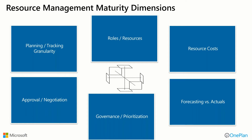Do you want the acquisition of resources for your projects to be a negotiation process — something formalized where functional and project managers can collaborate? The project manager states a need for a specific type of resource, and the resource management organization helps validate the sizing and determines who specifically will fill that role. Then there's governance and prioritization: how do we rationalize or balance the demand for projects with the reality of the resources we have in place?